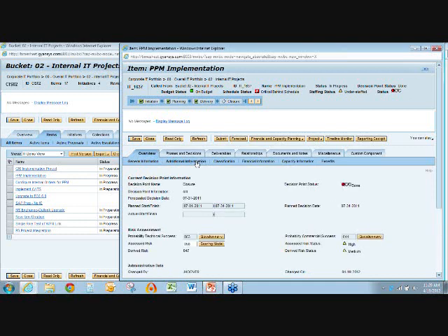As we go through the overview, we have additional information now here, and Ian alluded to it early on, our portfolio prioritization. This is part of where that comes from. So if this project, this one's already in WIP, but if this project was a new project on our roadmap, we could do questionnaires which are completely configurable for risk. You know, what's your probability of technical success, commercial success if it's some kind of profit or a new product development type project. So you can take that into account when you run your report.